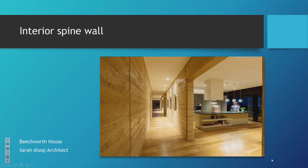It was unbelievable. And anyway, do you remember this, Marcy? We unloaded this bloody ramp and backed it up to the thick edge of the wedge up to the building, put blocks of styrofoam so it wouldn't hit the walls, pegged it down, and then we'd built in these big outriggers that came out to the side so it wouldn't tip over, and we pegged those down with star pickets, and it was pretty good.